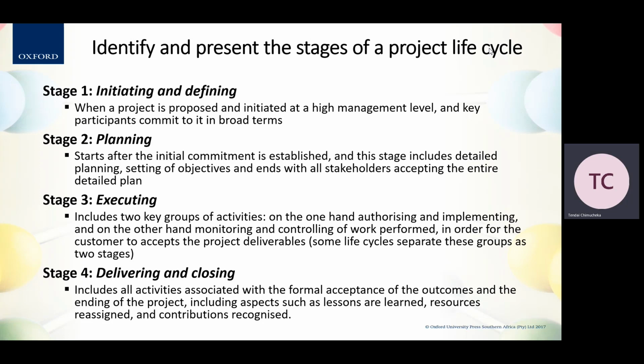Then your stage four, which is your last stage, is delivering and closing. This stage includes all activities associated with the formal acceptance of the outcome and the ending of the project. This also includes the lessons that have been learned, the resources that may have been reassigned during the project, and the contributions that have been recognized during the project.